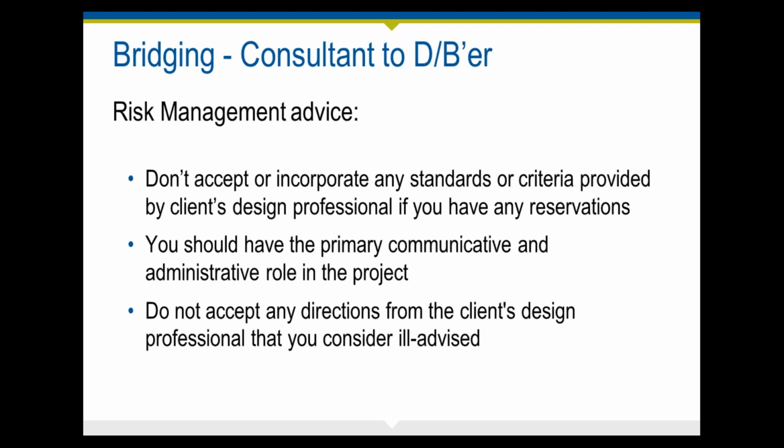So if you, as the design builder's design professional, have any reservations about any of the recommendations, then you certainly should not be accepting or incorporating them into the final design, because ultimately it's going to be your responsibility. And even though the client's independent design professional may review design development or construction documents, don't expect them to share any liability for errors and omissions in those documents, because they will most likely be held to have been prepared under your supervision.